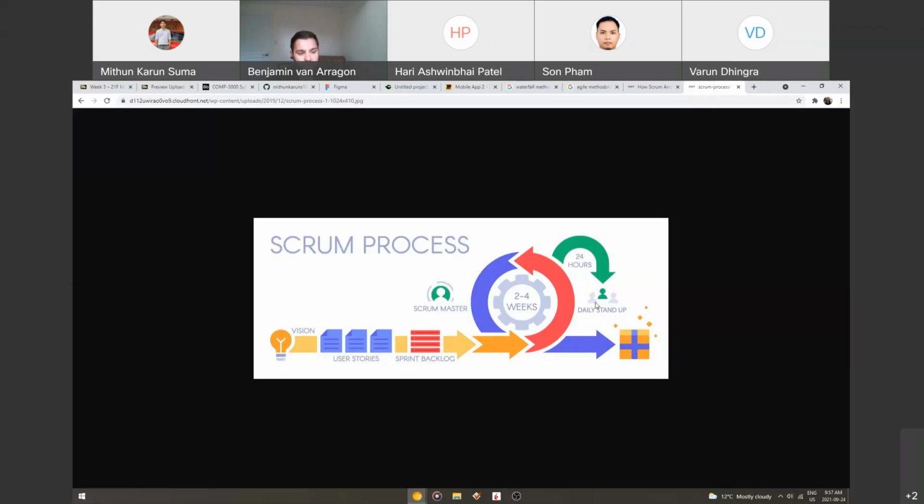So the daily stand-ups: basically every day, every 24 hours in these 2 weeks, you meet together, you have a Zoom call, and you say, okay, what are you working on today? What do you need to get done? What are you developing still? What's blocking you? So if you're the database guy and you don't have the data, or you want to make the policyholders document but you don't have the stuff in the database to actually load it, you can say that's a roadblock for me. I can't make my screen because I need the database to be populated, right?